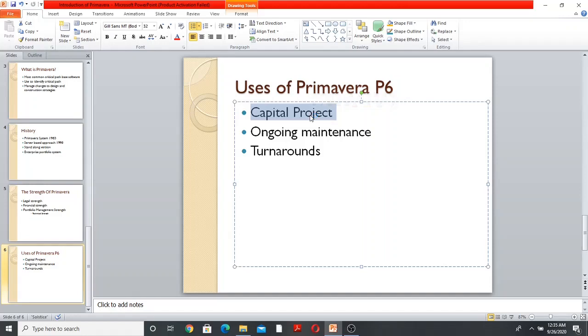It is typical for capital projects to move through a number of execution approval gates as the project moves from conception to execution. The client group will typically manage the project and integrate the schedules and other project data from the project contractors and suppliers.